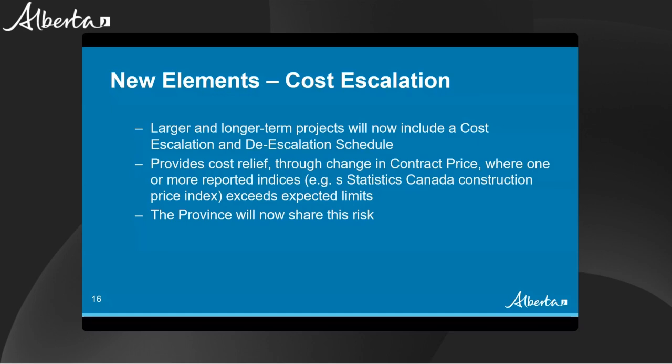In the case of direct fixed stipulated price contracts, such as design bid build contracts, the province will provide the adjustment formula. In the case of construction management contracts, we are inviting the construction manager to propose cost escalation formulae for its major scopes of work. The province will also either set out or approve, as the case may be, the timing for calculation of the adjustments. Generally, this will be at substantial completion.